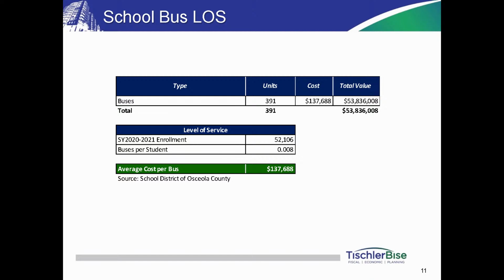I don't think you want to use one construction cost per square foot for each school level, because it's a different level of effort, a different footprint, different amenities, et cetera, with elementaries versus middle. But if you got one that we know is good and accurate, you make your assumptions up or down. Let's say the one we got that's good is high school. We know middle school's 90% of that, and elementary's 80% of that. I don't really know what the real numbers are, so I wouldn't want to set this up and then be upside down.